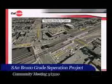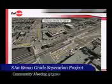So this is the shoe fly that Todd alluded to. And a shoe fly is nothing more than a temporary bypass for rail. So essentially what's going to happen, before this slide popped up, what you're not seeing off the screen, is there's going to be some track work going on to the north, and there's going to be a temporary station constructed immediately to the south of the existing Caltrain station. What that allows us to do is ultimately shift our train traffic from the existing main lines, shown in this slide, onto these temporary shoe fly tracks.